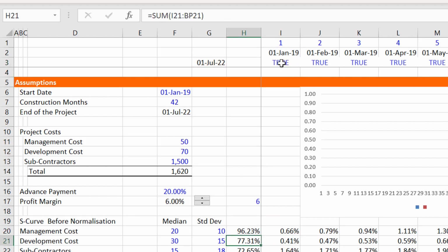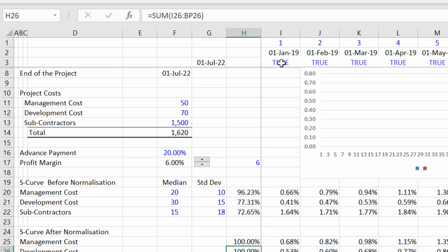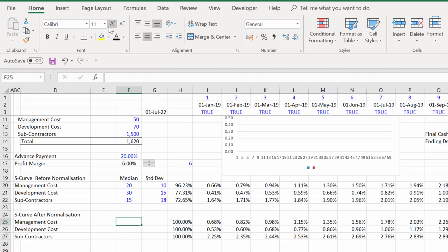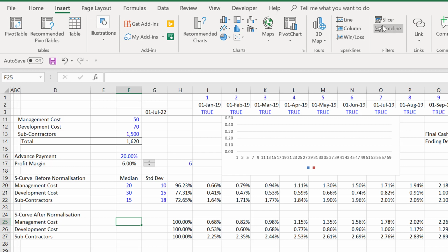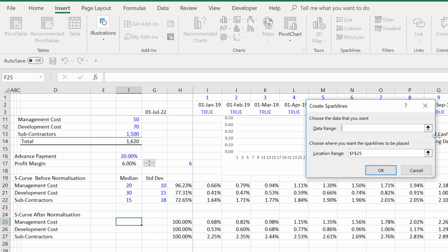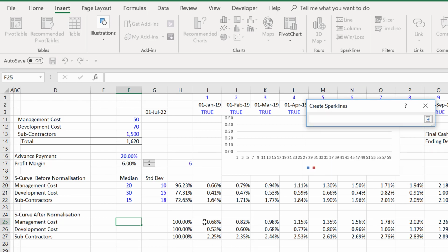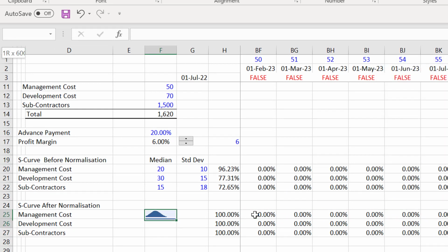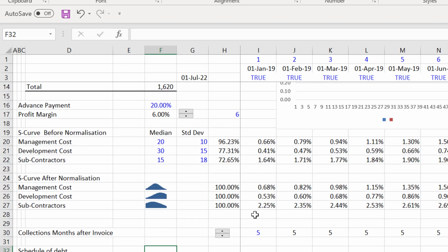And then when I sum it, it doesn't sum to the whole thing because we have little different patterns. So I just say, okay, let's normalize it. Let's take this curve and divide it by the total. And then, I'm getting into these gimmicks more and more, which is kind of stupid, let's put in a column and show what the S-curve really is. And we can kind of see how it is. And we have a couple of little different patterns.